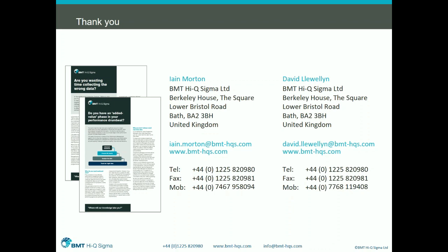And it auto-populated CPRs 1 and 5, and it was at this point we were introducing EV to a lot of our project controllers in DNS. So it was really helpful for them to understand the EV report and the VAR explanations, the variance analysis report explanations, that are valid and that are useful for their leaders. Yeah, so it's an interim measure. Now they've adopted P6 and they're starting to automate that process.